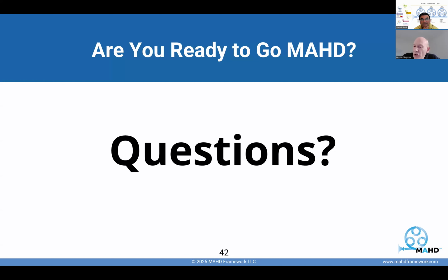Yeah, 30-30. It's one thing that we've experienced often: when you look at your gate process, it's often kind of a third, a third, a third. A third of the things that you need for a gate review, you're doing naturally as part of the MAHD framework. A third, you're going to discover they really weren't necessary at all. And a third, you might have to prepare a little bit of modification just to hit those gate milestones, but it's really not too bad.